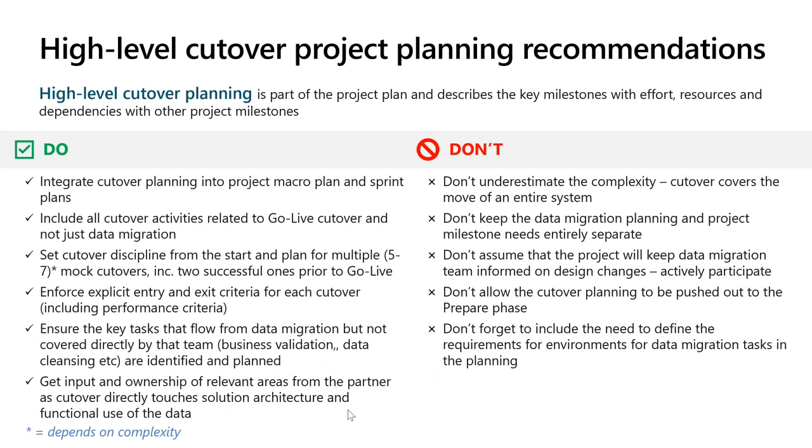By that we mean the plan that is part of the project plan and describes the key milestones with effort, resources, and dependencies, and it's tied to other project milestones like SIT, SAT, UAT, training, etc. So you're expected to meet interim milestones within the project in order to deliver the right quality of data, the right data entities for the different stages within the project. And that's what I mean by the high level cutover plan, right?